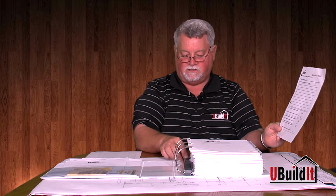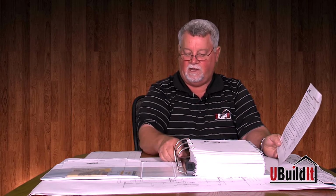The next question on the deal, and the last question, is there a budget or a phase meeting needed in the office? So when they start approaching those stage 2 and stage 3 phase meetings, we can actually put yes on there, so the people in our office can try to schedule that when everybody can be available to come back in to do the budget meeting and the next phase meeting. Ideally, the bidding coordinator who did the budget would need to be in that meeting also, so they could review budgets together.